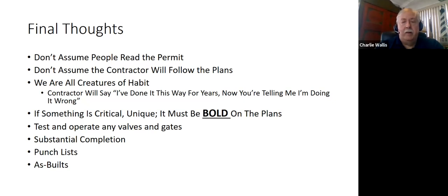And then finally, the final documentation, the as-built. How was the project actually built? What is here as opposed to what was planned? This all needs to be noted on the plans and any other documents that the contract may require.